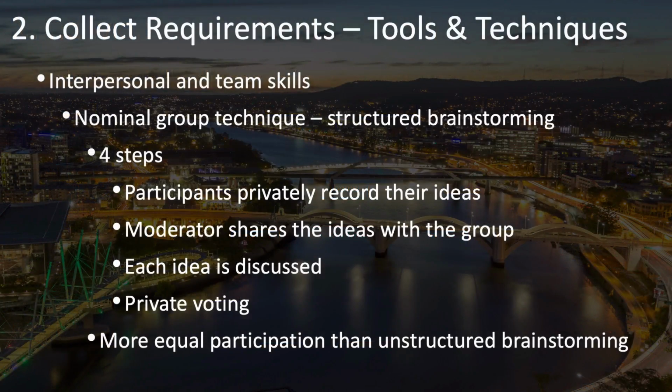Another interesting technique that you can use in collecting requirements is the nominal group technique, which falls under the category of interpersonal and team skills. This nominal group technique is a form of structured brainstorming. It's like brainstorming in that you get a group of people together, generally face to face, but it's got 4 specific steps to it.